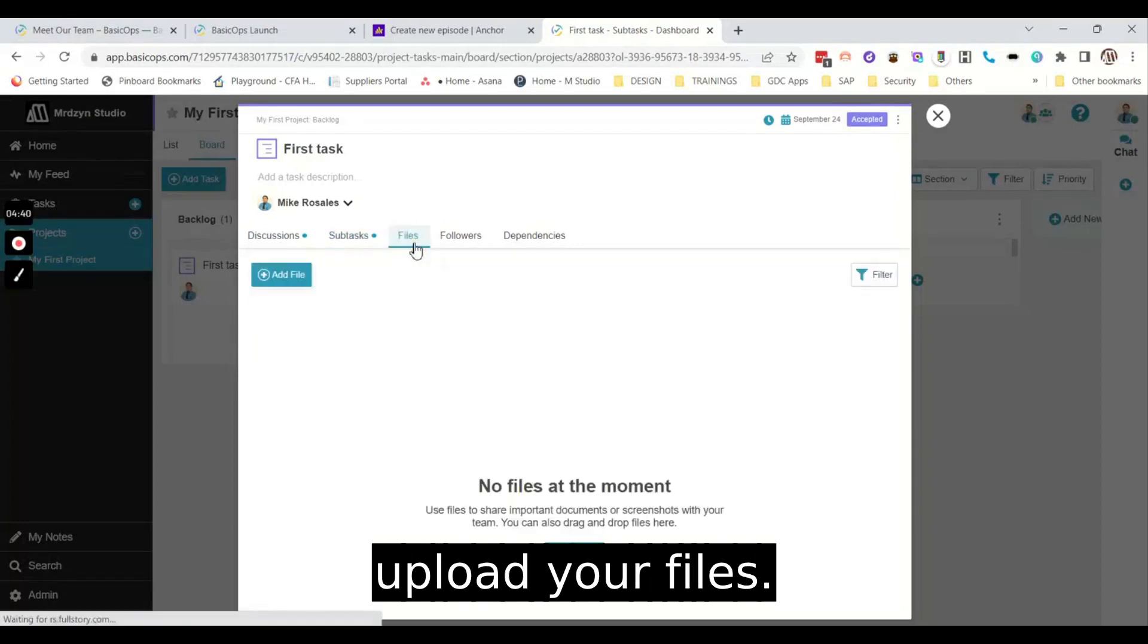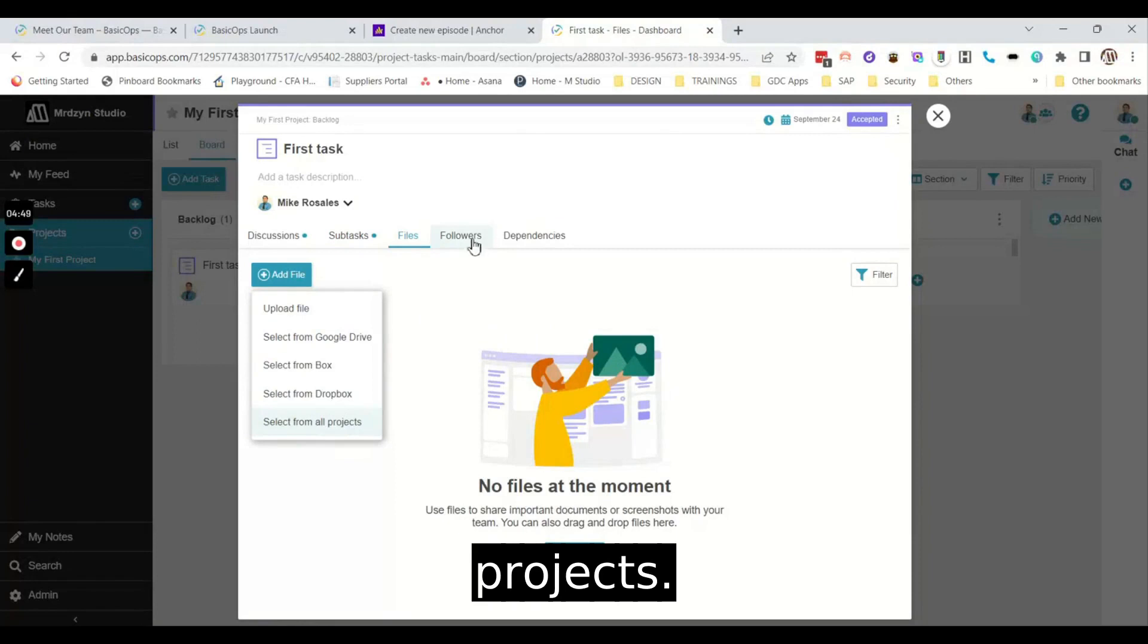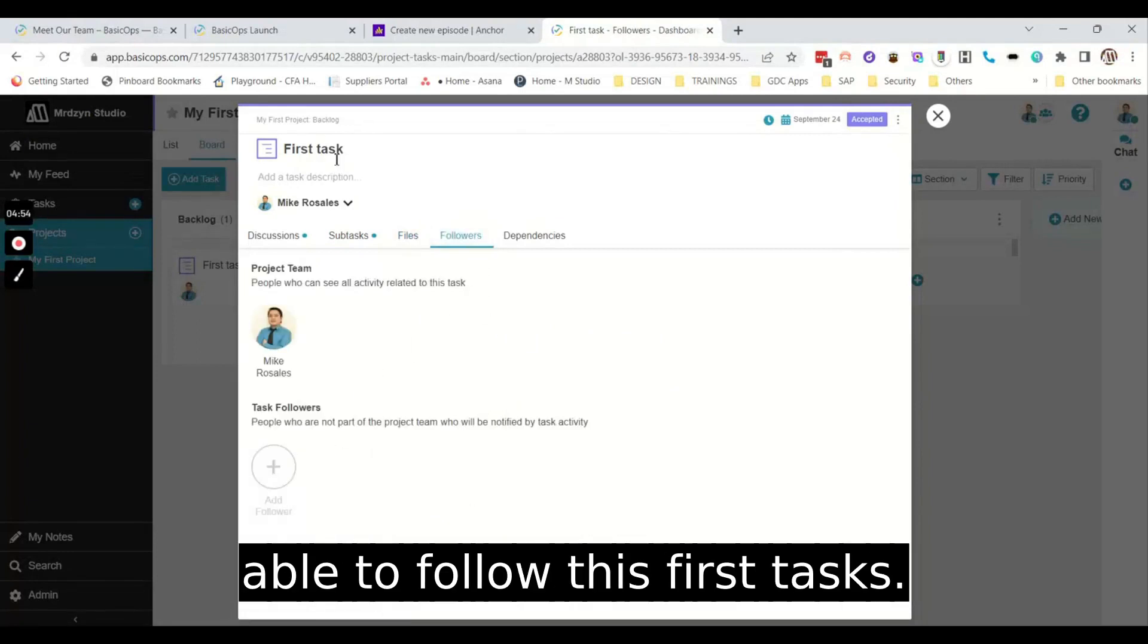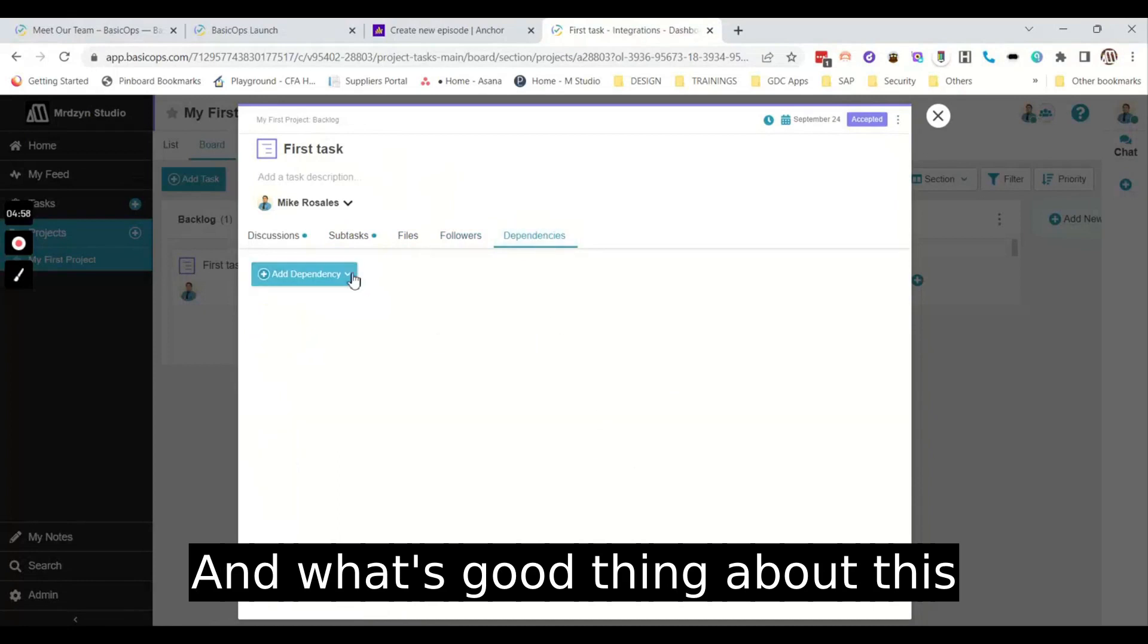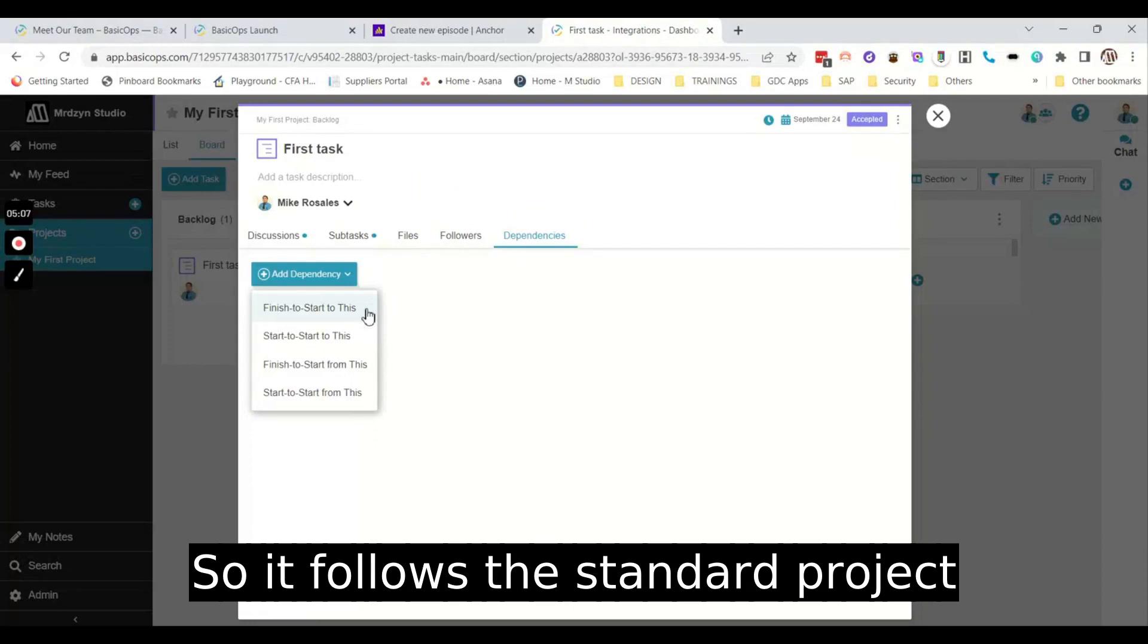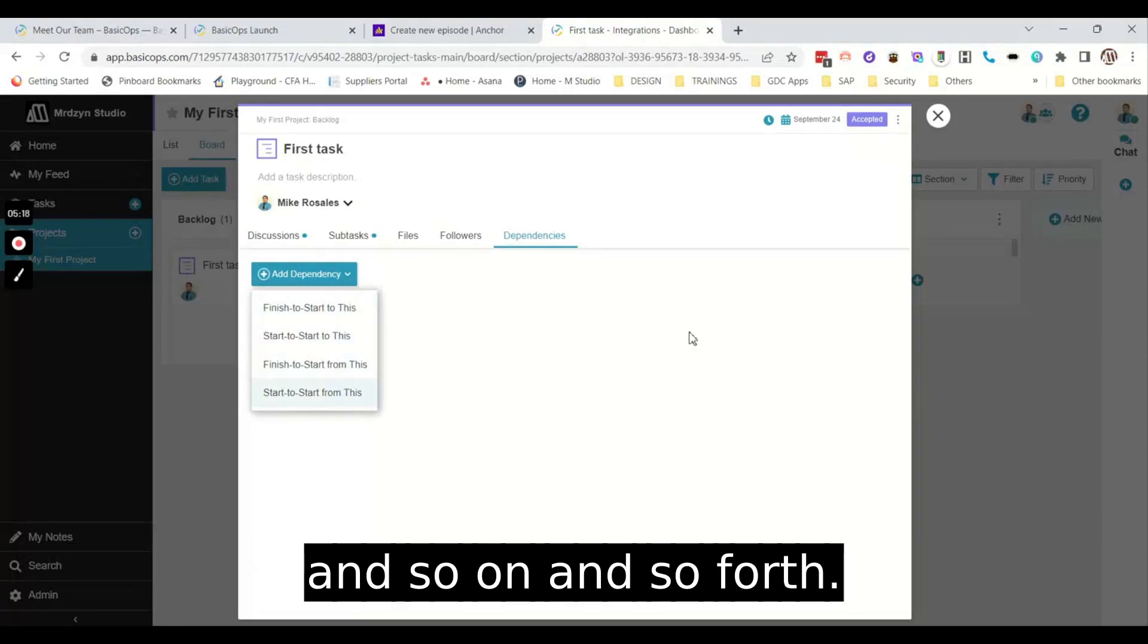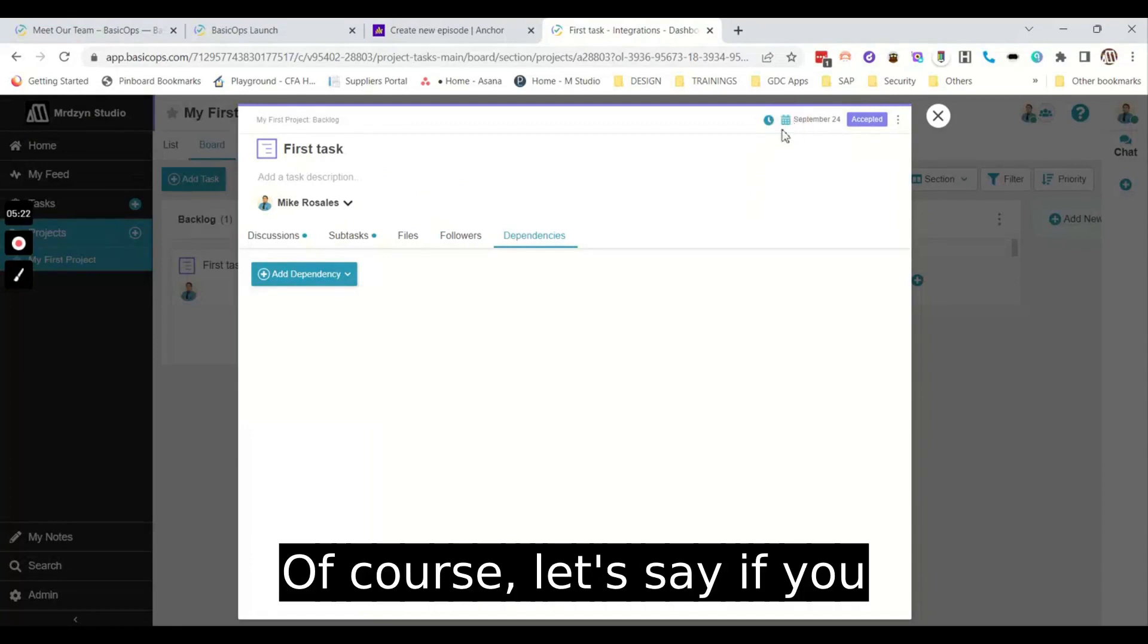Then you'll be able to upload your files. You can upload from Google Drive, from Box, Dropbox or from other projects. Now your team members would be able to follow this first task. And what's good about this one is they're able to have dependencies on the task. So it follows the standard project management, whether it's finish to start, start to start, or so on and so forth.